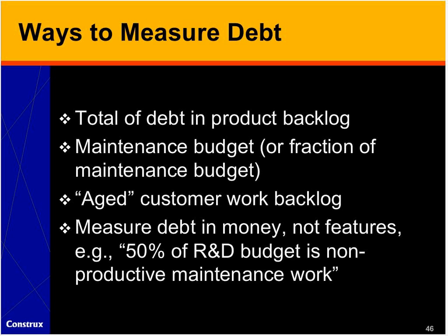We have one client that basically says we look at the backlog of customer-facing work, and we age that in the aged receivable sense. And when we get anything that is aged beyond 180 days, that automatically goes to SEV 1 and becomes a top priority to fix. Even if it started out as a SEV 2 or 3 or 4 defect, once it gets to 180 days, because we don't want this debt to accumulate indefinitely, they just escalate it to SEV 1.